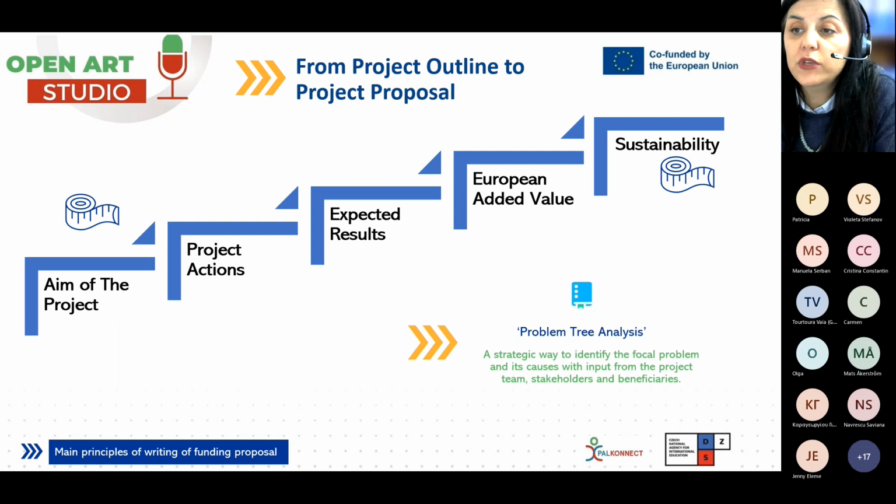And which are the steps to outline the project proposal? So this is the second step of development of the European Union project. It's actually the drafting of the project outline. It should be no longer than a few pages and should include the following subcategories: project title, applicant or lead partner, objectives, planned activities, target groups, financial planning, and contact address. This outline helps to make a loose idea more prestigious, serving as a clear format to share with potential partners and a useful layout when seeking advice from help desks.